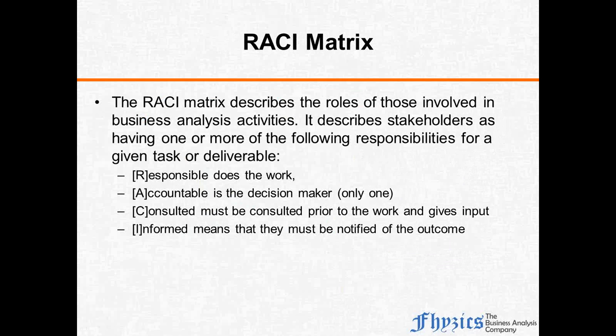Not all stakeholders are equal, right? So far what we were discussing is, we just put these stakeholders in different buckets. But now we are saying, not all stakeholders are equal. The stakeholders have different levels of engagement. I have to completely satisfy the accountable people, because if I'm not satisfying them, or if they are not buying in to what I'm recommending, maybe they will not sign off on this project, right? They will not agree with your requirements. Ultimately the accountable people have to approve the changes you are going to introduce. These are all the accountable people.